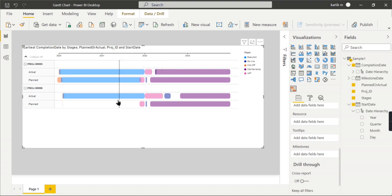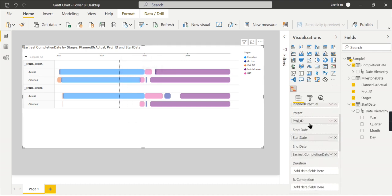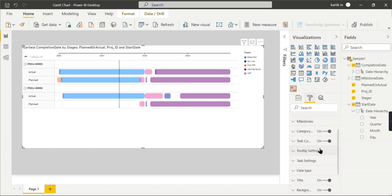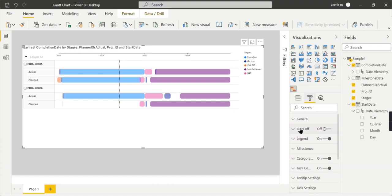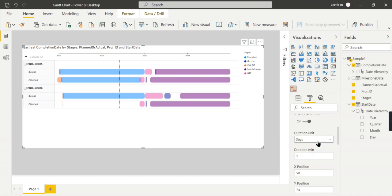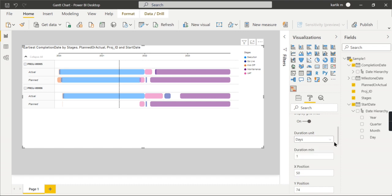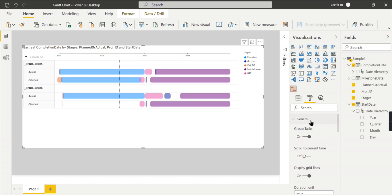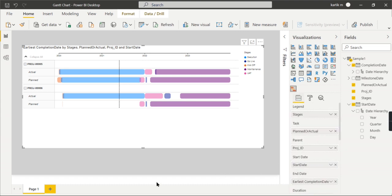Instead of the end date here, you can have the duration field. If you do not have the end date but you have a duration start date and duration, you can have that column here. Then in the properties you have something called duration. You can see here a number of duration units—whether you are mentioning it in number of days, or duration in weeks or hours. There might be sometimes you're tracking every day, so duration can be hours or minutes. You need to mention that here—you can change that property as well.